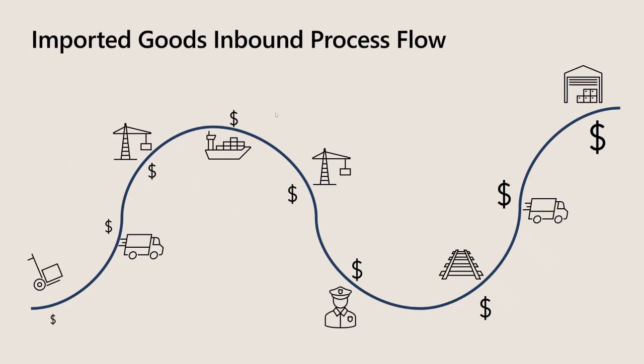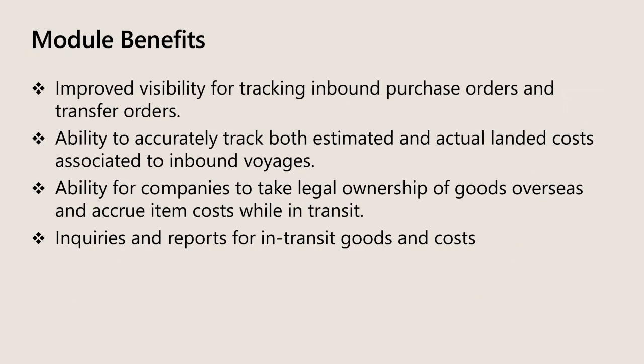So from a module perspective, within the application, what the landed cost module provides for us, in addition to the costing that I mentioned on that previous slide, is improved visibility and tracking of those goods. Throughout that journey, we now have the ability to record as each of those different steps is executed: as it's leaving the vendor, arriving at the port, on the water, getting received, you can be updating the status, and we can be setting up lead times that will give us an accurate picture of when we realistically expect to receive those goods.